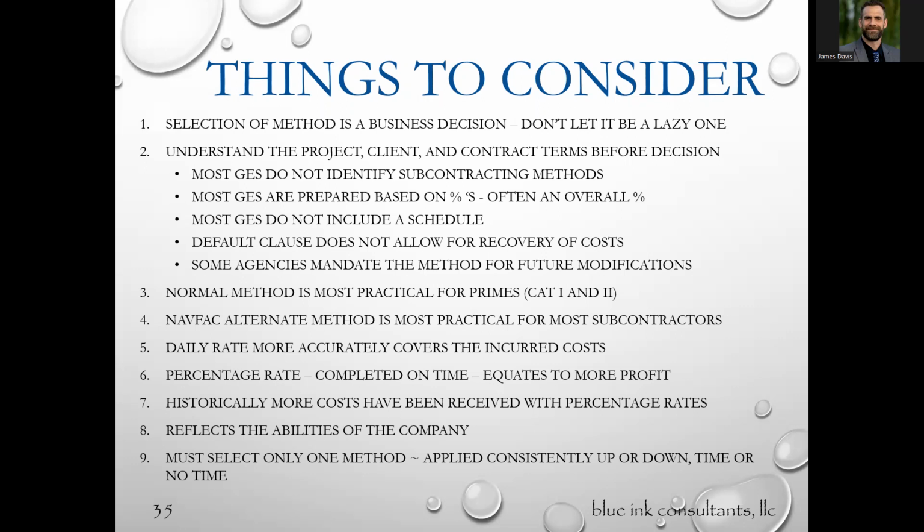So let's say you're buying janitorial supplies and you have to buy quite a bit of the material. You don't actually produce cleaning solutions. You have to buy those. Well, that person selling that is also entitled to their markups. Government doesn't always recognize that you have to have markup on top of their markup. So sometimes the government doesn't take into consideration the layers and then the expenses that go into doing that. So just understand that, make sure that you are aware of it.